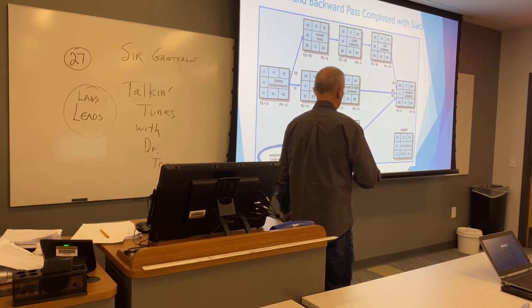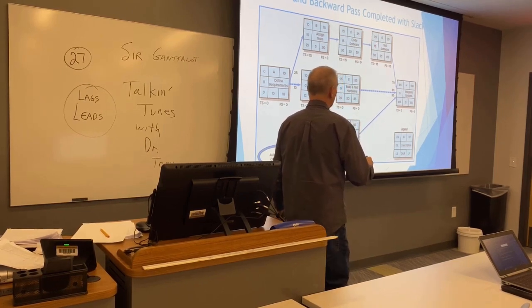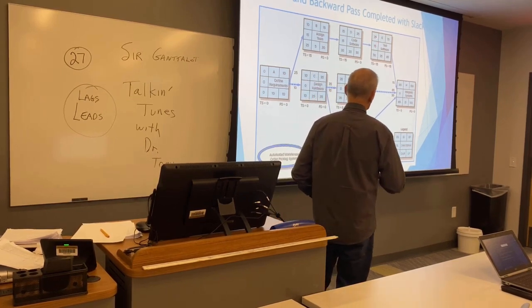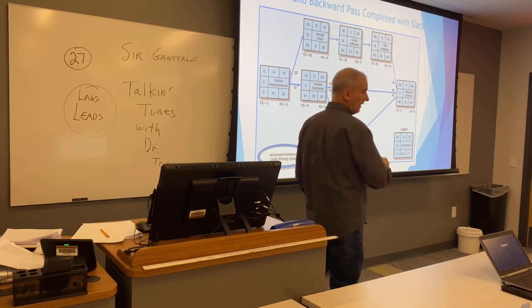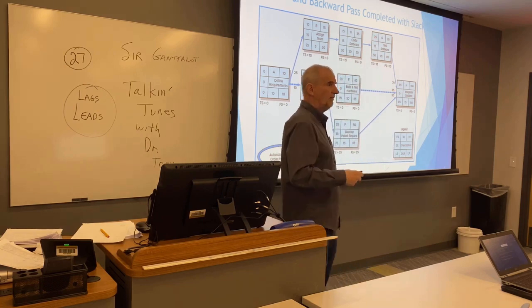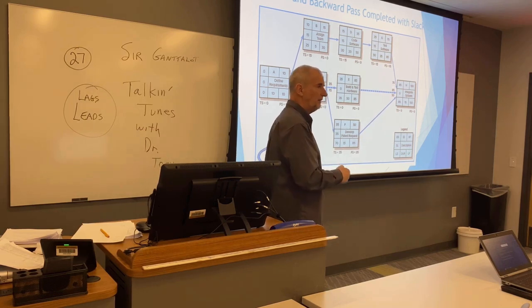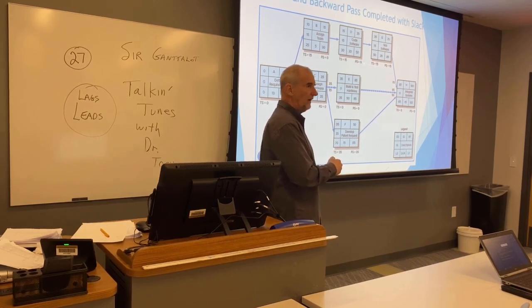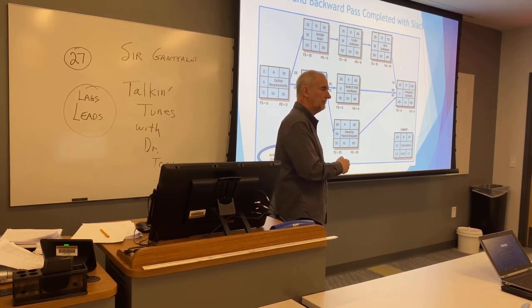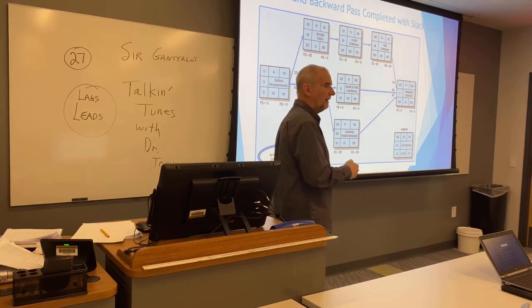Likewise, 35. Now, what does this mean? This means that I could start this on day 35, and I'm going to be done on day 50, aren't I? And if I'm going to work on this one, I don't have to start till day 85. So on day 50, I can go on vacation, right? I can go on vacation for 35 days because I have free time.